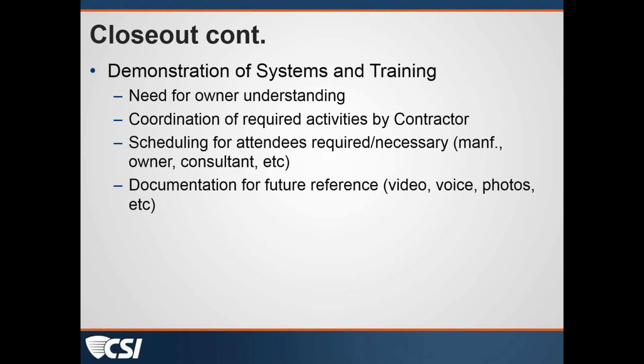So I guess maybe they're letting the contractor mark up a copy, a BIM model copy, and then they either accept or reject those changes. But then that BIM model is turned over to the client as an operations platform, if you will, for their facility. So they have actually tied the BIM model to their record drawings, to the owner's operations of the various plants.